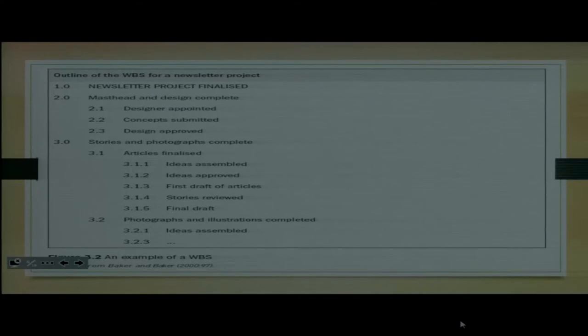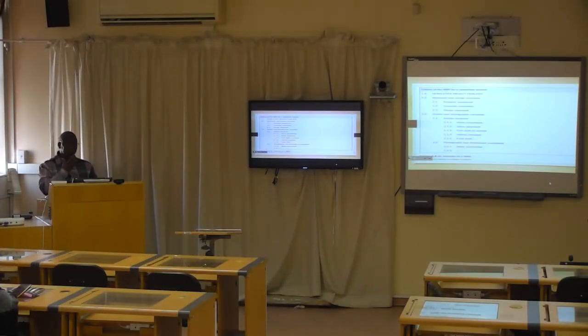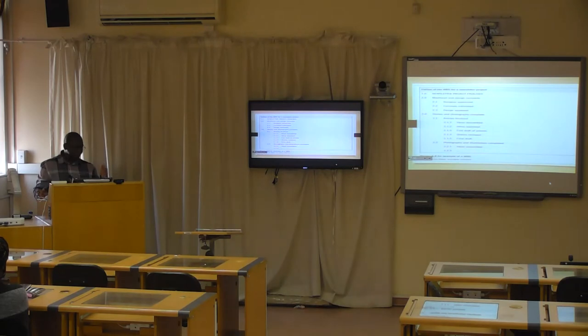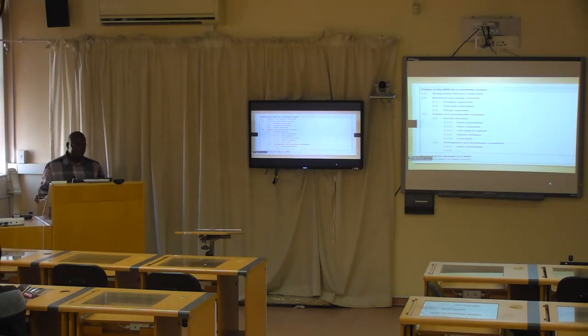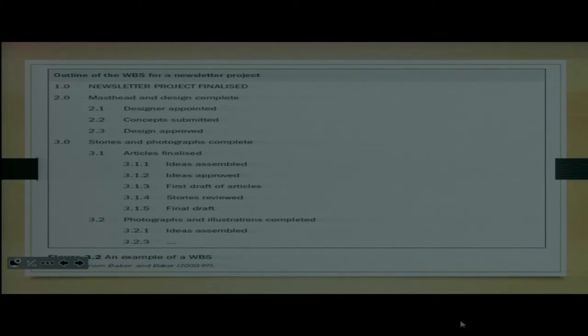The example I use in class is a loaf of bread. Trying to eat a loaf of bread whole is challenging, but once you slice it, you take those slices as activities and deal with one slice at a time — you can manage nicely. A work breakdown structure is basically like that. You start from level one, which is your completed project, and then cascade it down to your very first activity.